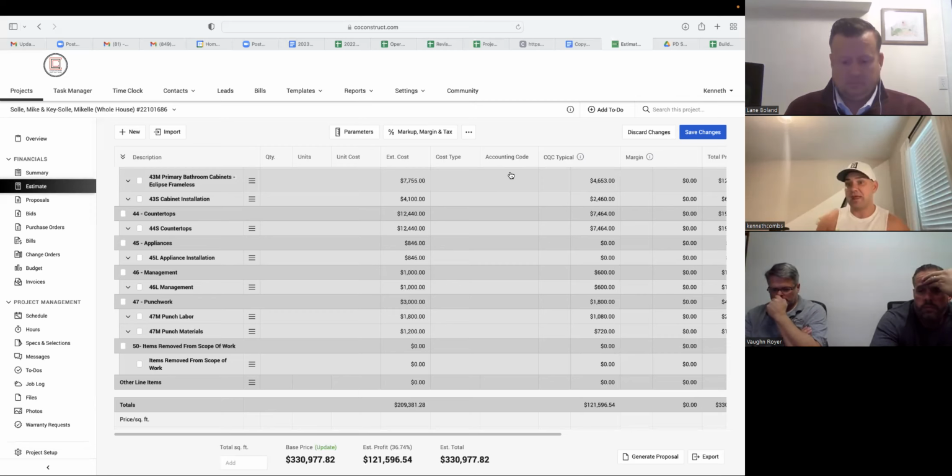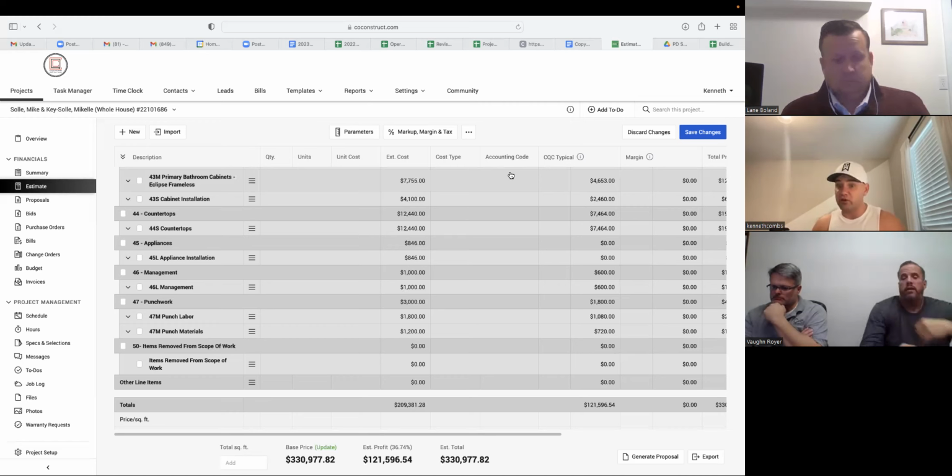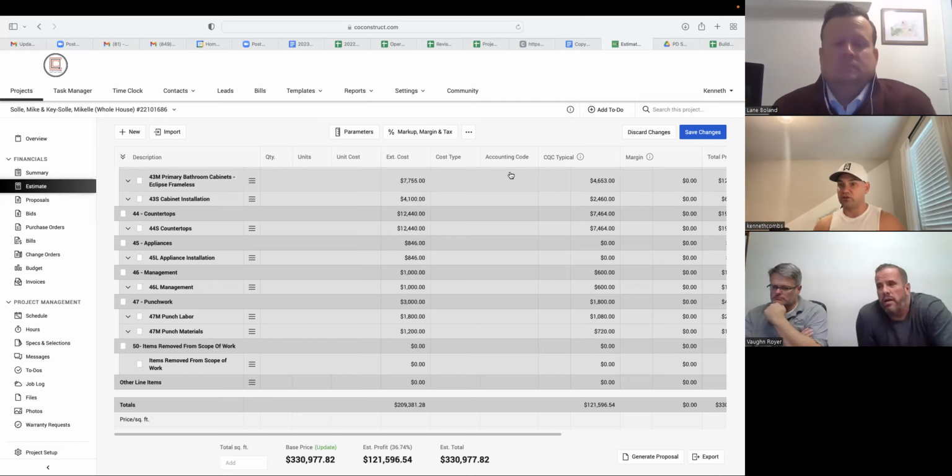Then at the next meeting you have with them, you explain that to them and where that's at and the way it's trending, and they either shrink it back down and go to a 48-inch range, or they say, I'm willing to spend that extra money that you didn't know in the first meeting, because you can't possibly get every detail from them in one meeting. And if you do, you're there too long, right? Because you're not close. They're just a prospect.